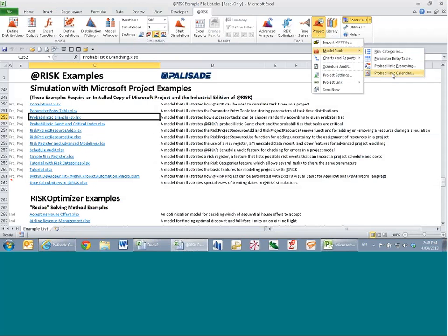So we can include that in the calendar itself for a particular resource, such that in every day in December, there is a 20% chance that resource essentially will be unavailable. Likewise for sickness and so on. So there will be a range of possibilities there from getting no rain to getting lots of rain, and therefore the final finish date includes accurate information about what the rain delay is. This is far more accurate and sophisticated than simply saying, well, let's add 7 days for rain delay to the schedule. Now we can look at the probability of needing to add 7 days, 10 days, 3 days, and so on. That's the probabilistic calendar option.